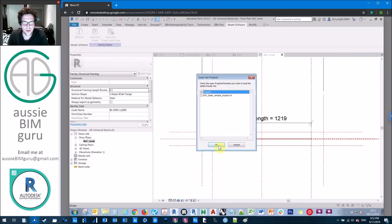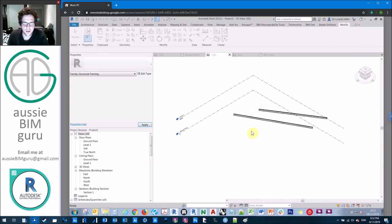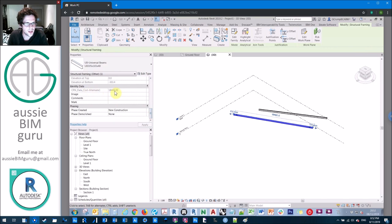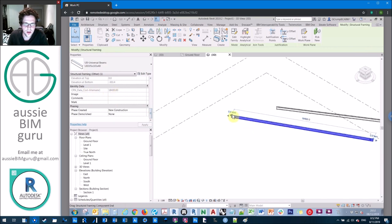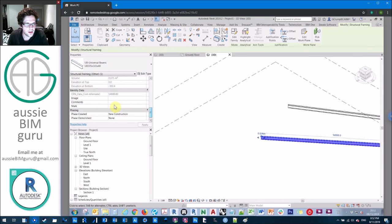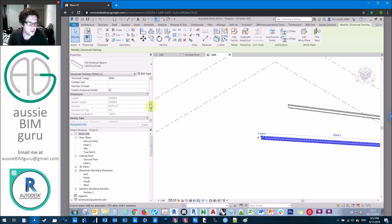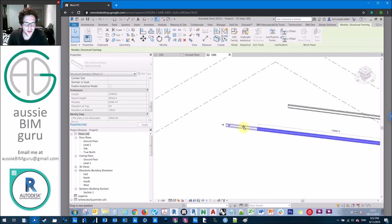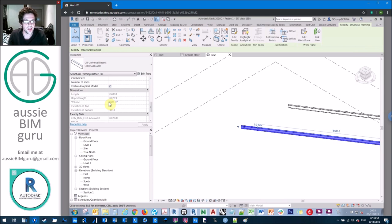I'll load this into the project and override parameter values. We should have an instance parameter showing our cost alternate — currently $18,400. Let's change its length: now it's $14,800. The formula is working because we're doing a dollar per millimeter. If I change the extension, you can see the reporting length is $17,020 — and so is the cost. But notice the length isn't. That's where the extension versus length behavior comes into play — a little lesson about beams snuck in on the side.